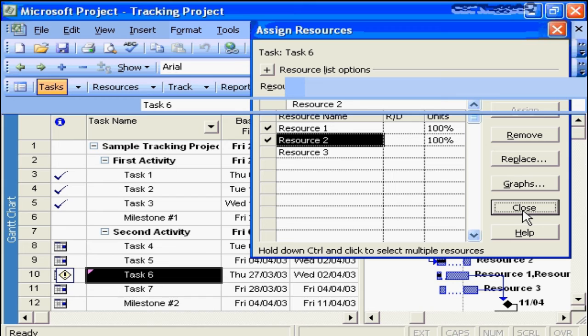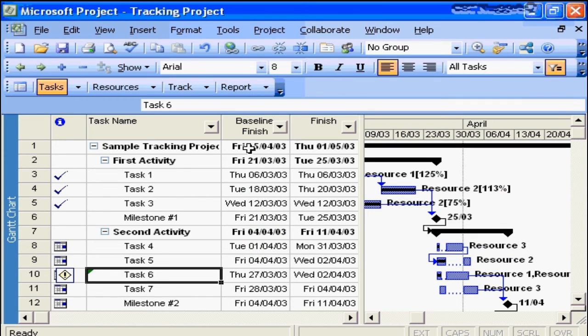And we look at our end date, it's gotten a little bit better. We're still not back to our original proposed finish date, but it's not as bad. So adding that extra resource to that task shortened that task, and allowed it to bring the task more in line. So we need to take more actions as a project manager to try to improve our project delivery situation.